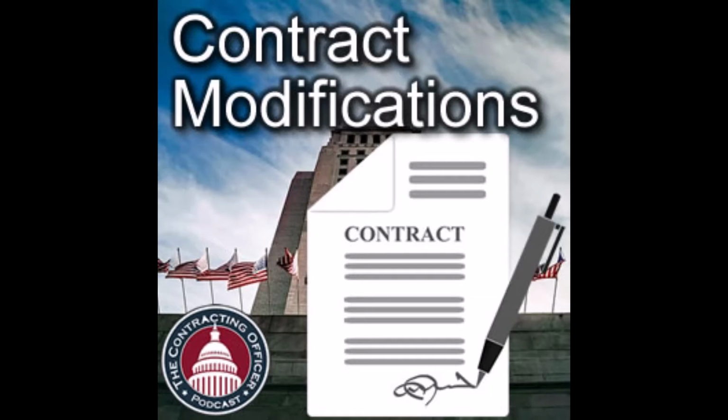And if what you want them to do actually contradicts something that they're already on contract to do, they're going to keep working on the contract as it's written now, which may be counterproductive, right? And you're still paying for stuff you don't want. So FAR 43.102(b) gives the CO the power to say, get to work now. Here's the change. Here's what the change is going to be. We're going to negotiate this later. So get to work and then give us a proposal for what it's going to be, and we'll get it negotiated. But in the meantime, industry's making progress delivering what the government actually wants now, which could be different than what they thought they wanted before.